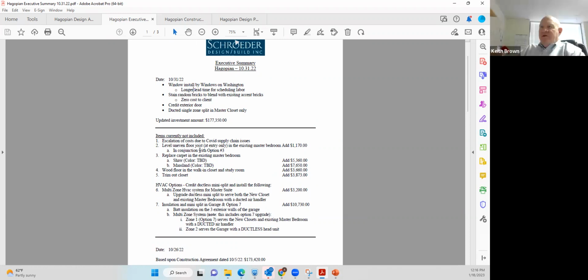Does it make sense? With this client, you definitely need that here. So as a PD, all the changes after the executive summary, I would move it up here, so it's more current. And then update this amount with the ProS number after you've updated all the pricing.